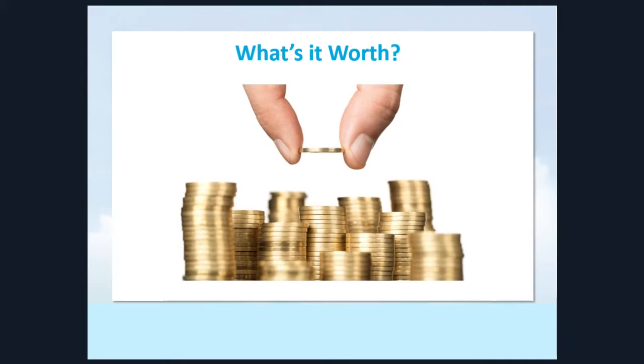Many people prescribe IT budgets in absence of understanding the need and the requirement based on the outcomes. We may ask for an outcome that has a value set very low, but a very high cost to achieve. So IT needs to be part of that conversation to say, hey, if you want to open a new office in XYZ, there's an entire build-out cost to get that office up and running IT-wise that may make the opening of that office impractical.